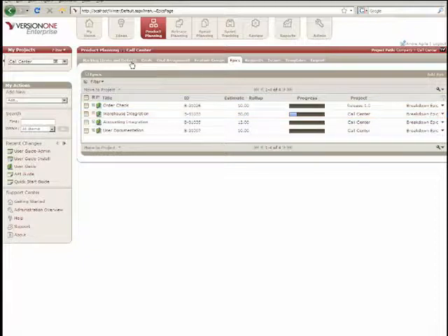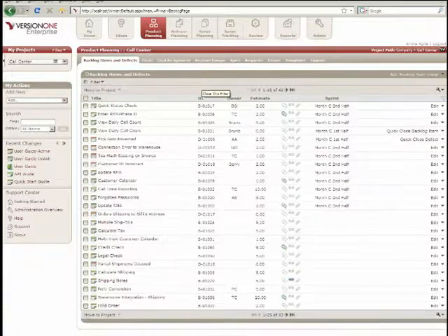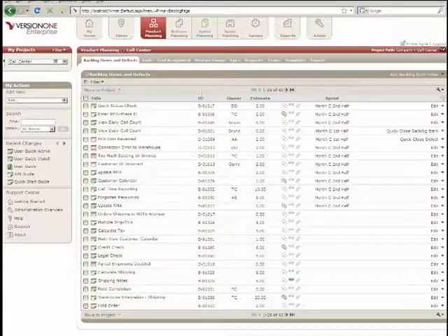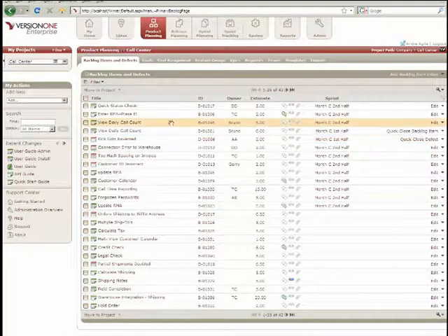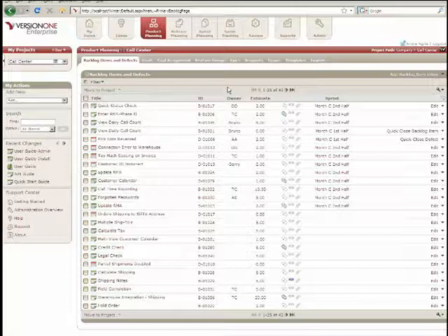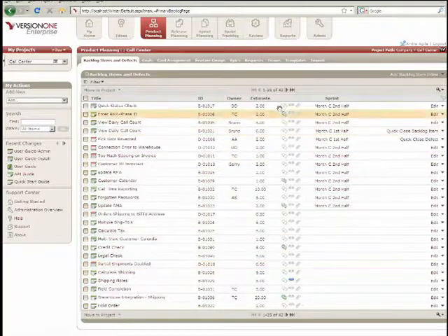Okay, we've got a lot more questions around sprint and release planning. So how are defects addressed in sprint planning? Defects are treated the same as user stories. In version 1, you notice we have different icons. The red icons are those for defects or bugs. You've heard me use the term work items because I'm referring to both defects and user stories. And they're treated equally. The product owner is still managing these defects and ranking them.